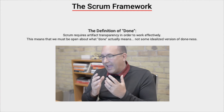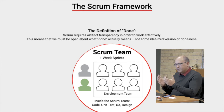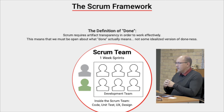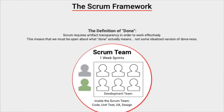This means we must be open about what 'done' actually means — not some idealized version of it. Imagine you have a Scrum team doing one-week-long sprints. Inside the team, every sprint they're building software: they do coding, unit testing, they look at the user experience, the design of the product. Within a one-week sprint they do a mini project — coding, unit testing, UX, and design — and that's what they actually accomplish.